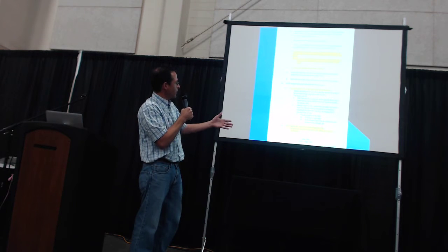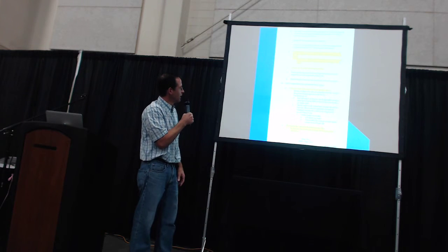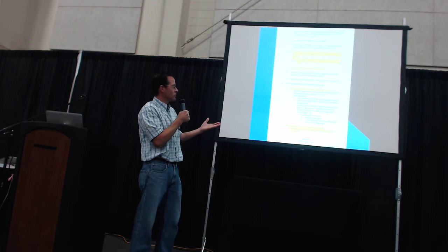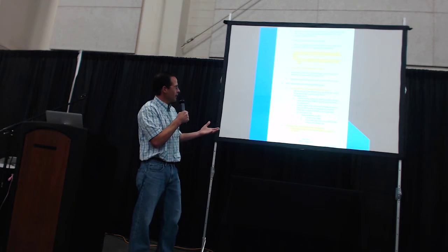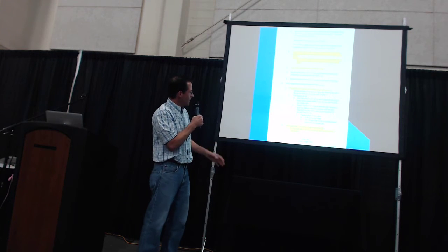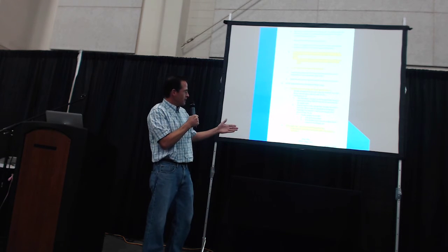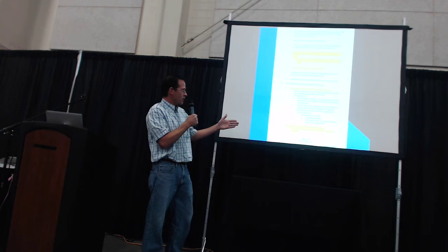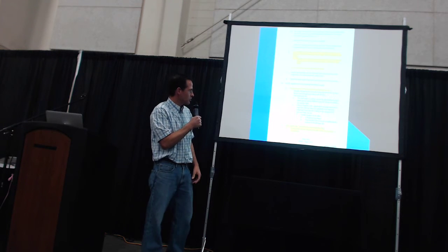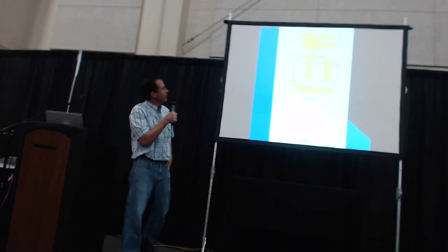Okay, now we're getting to the price adjustment, the penalties for piles that are out of alignment or out of location. So first of all, there's a reduction for deficient strength of concrete, and that's covered here and also in section 03055. And then a price adjustment for reduction of out of tolerance piles. Anytime there is any sort of price adjustment applied, then there has to be a demonstration of the technical adequacy of the piles driven out of plumb or plan location. And then these are the penalties.